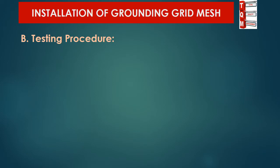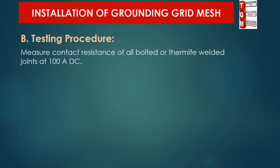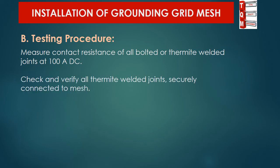Testing is the second part of this procedure. Before backfilling the overlaid grounding grid mesh, ensure the following tests and checks are done. Number 1: measure and test the contact resistance of all bolted or thermite welded joints at 100 ampere DC.